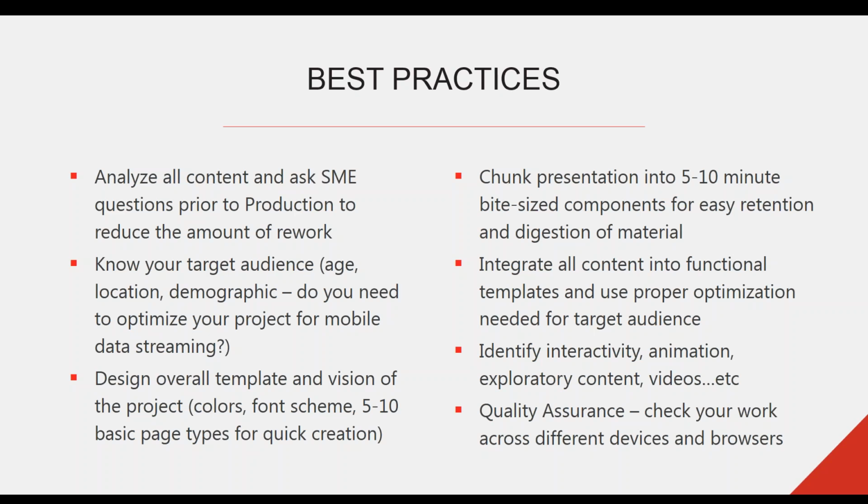An important thing for templates is to make sure you start with the colors, the font scheme, and maybe 5 to 10 basic page types to quickly start off the project. And what we do is tell our instructional designers that if throughout creating storyboards, they realize that there's a specific page type they need that wasn't supplied to them in the first 5 to 10 we've done, they talk to the visual designer, and he will then make a new page type, update the template, and then we can use that moving forward. In the beginning, we tried to do 10 to 20 page types. We realized that took more time and we didn't use all of them. So it's good to start small and then grow as you evolve.